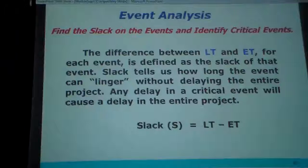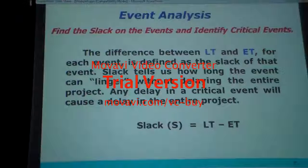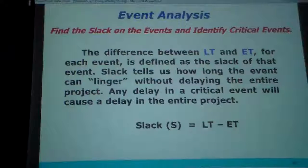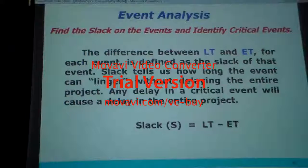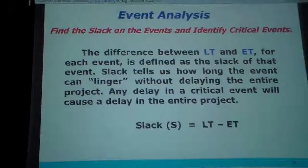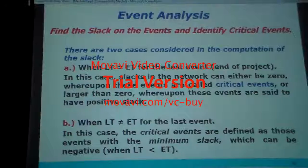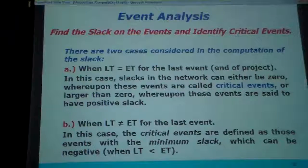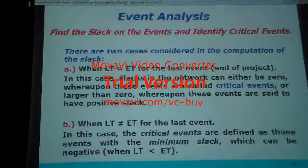Find the slack of the events and identify critical data. The difference between late time and early time for each event is identified as the slack of that event. Slack tells us how long the event can delay without delaying the entire project. Any delay in a critical event will cause a delay in the entire project. When we start from this side, we have to fill this down; when we come back, we have to fill this.